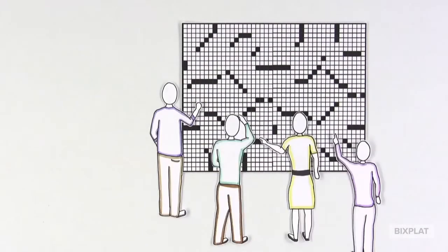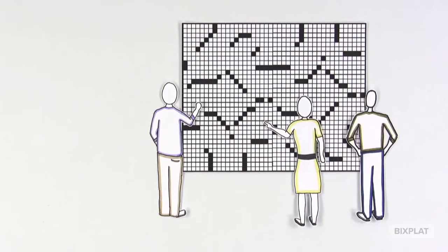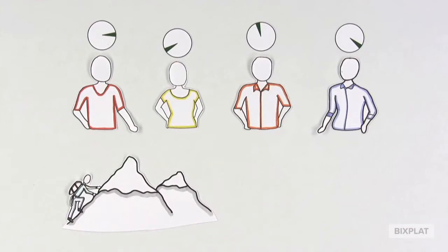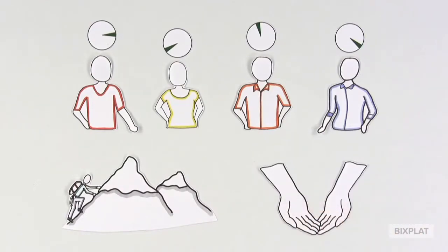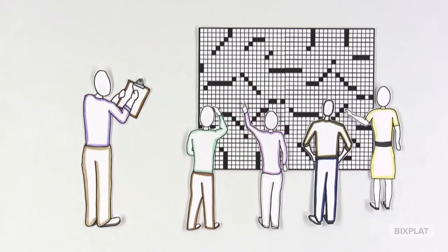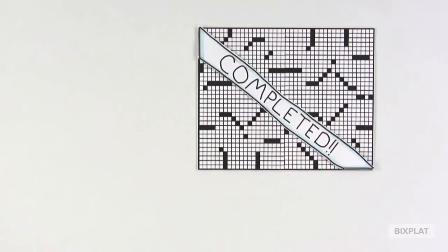The first process is identify stakeholders. Here we identify people or organizations that could impact or be impacted by a decision, activity, or outcome of the project. We also analyze their interest, involvement, interdependencies, influence, and potential impact on the project success.